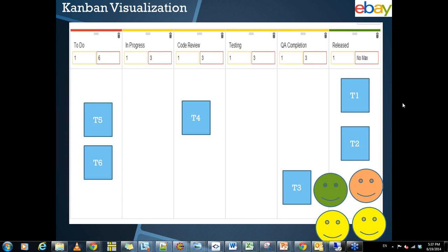What factors determine the minimum and maximum limits of each bucket? So one factor, to start with, is the number of engineers you have who can work on the to-do list, how many can be started in parallel. That will be the first factor. And as we said, we can evolve experimentally to see after one cycle is over how we can increase the minimum and maximum limits. And minimum limit is something that Kanban doesn't enforce much. It is the maximum limit that you have to actually look into to make sure that we are at work in progress.